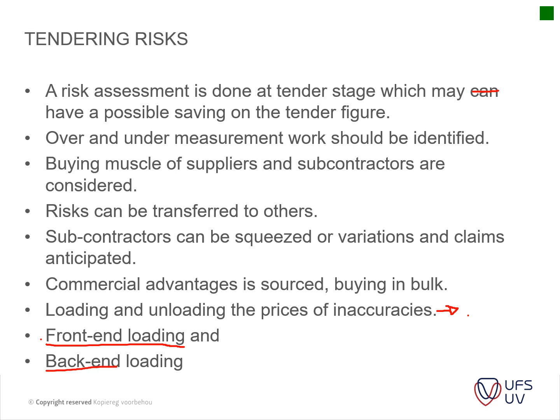And then obviously you get your back end loading, where you load some of your items at the back of your project. That might be, for instance, your finishes, etc. If you anticipate that it will assist you, for example if you can get certain items at a better cost, it might benefit you to load some of your items at the end of your project, or when you foresee that your cash flow might be low at the end of the project, you can load some of the items there.